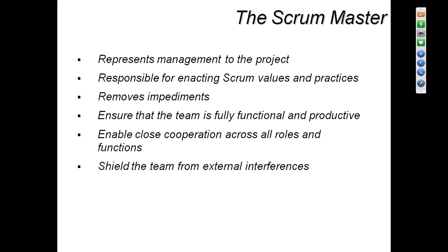Normally, in practical terms, the Scrum Master's role is conducting meetings. So what precautions do you have to take about the meetings? What are the different things you have to consider? The only thing is you will be discussing what tasks were performed yesterday, what tasks you are performing today, and what tasks you are going to perform tomorrow. Except for this, you cannot discuss issues. So these kinds of rules and regulations, priorities, different things the Scrum Master will be handling.